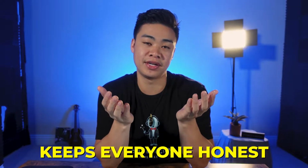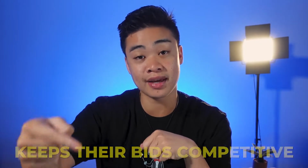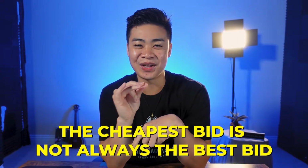Now, I'm not saying contractors are bad at all. It's just like human nature, like everyone is out for their own self-interest. And if you bring out multiple contractors, it kind of keeps everyone honest, it keeps their bids competitive. They want to compete with the other contractors so that you select them. So I always bring out at least 3 bids and I make sure that everyone knows that they're gonna be bid against, essentially. So I make it competitive so I get the best possible bids. Also, the cheapest bid is not always the best bid. Just, you should know that.